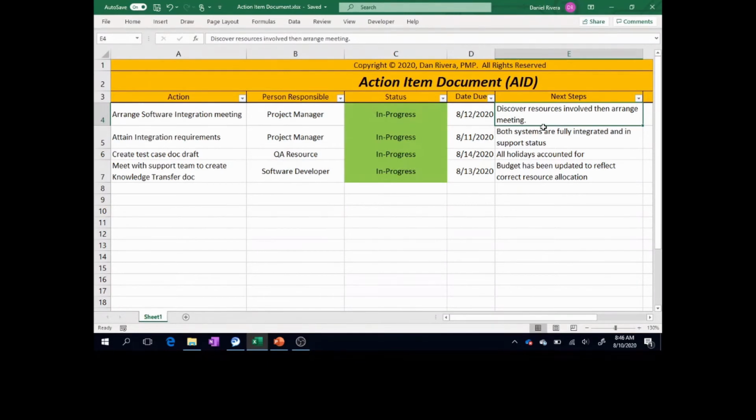One thing I learned from the beginning when I was a project manager is that I would put a date here and have the status as it pertained to that date. But I think what better serves you is to have just the latest status, because then the previous statuses become irrelevant. It almost becomes like reading a status report from two months ago. That information is not really relevant anymore. So the same applies here. Just have the next steps here, and if you accomplish something and there's another item to be accomplished, you just update that rather than keeping all the historical statuses.